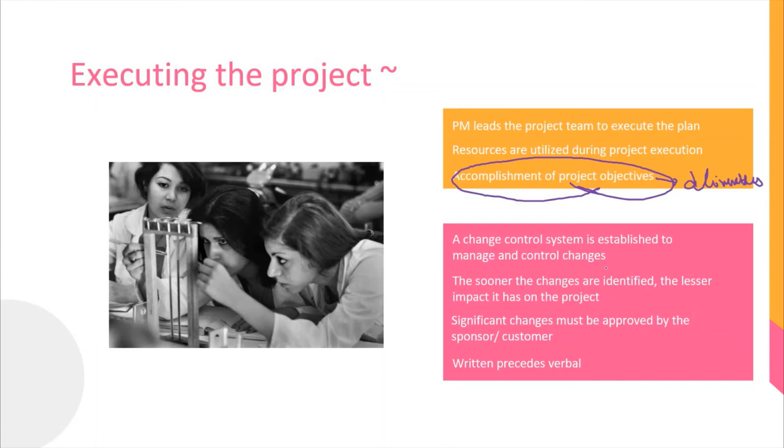In most cases, the customer is satisfied that the objective is complete as per the specification, budget and on time. Next is what I discussed earlier, the establishment of a change control system. The sooner the changes are identified, the lesser impact it has on a project.